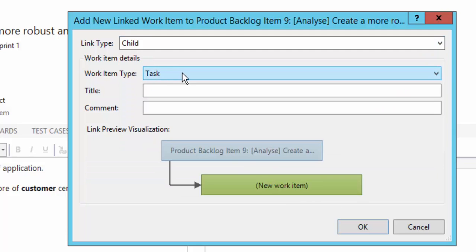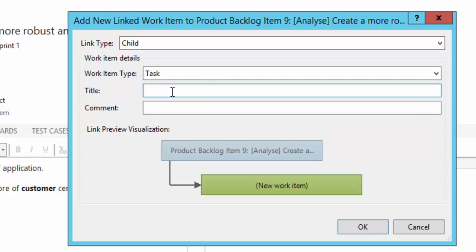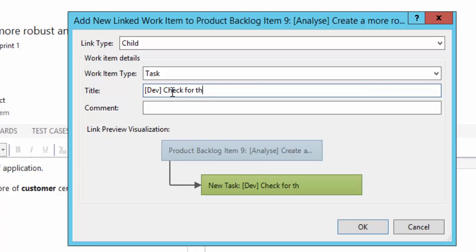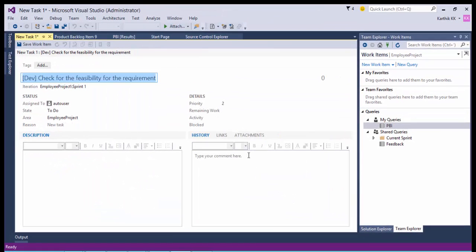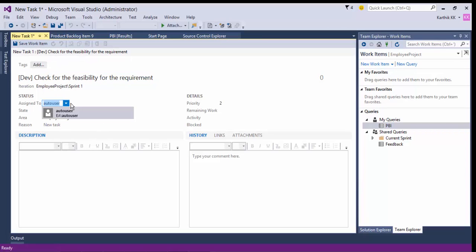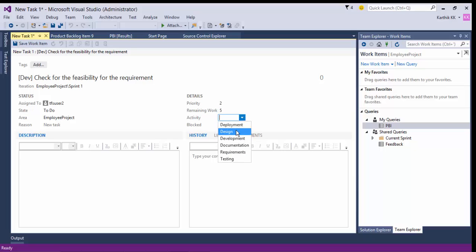I'm going to make this a child link type, and it is going to be a Task. I'll select the work item type as Task and set the title to something like 'Dev activity — Check for the feasibility for the requirement.' If I click OK, this new task will be created. You can assign it to somebody else, such as TFS User 2, set priority to 2, state as To Do, remaining work as five sprint hours, and the activity as a design activity.